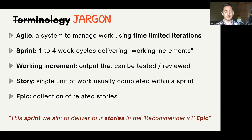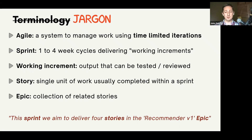A story is a single unit of work usually completed within a sprint — for me, that's 20 minutes to a few days of work. An epic is a collection of related stories, which is a really nice way of organizing your work. If we've got the epic 'improve the marketing team's data capacity in Q3 2021,' and we can see all related epics from the last couple of years, I'm laying the breadcrumbs for future data science teams to understand what's been done before — enabling reproducible data science.